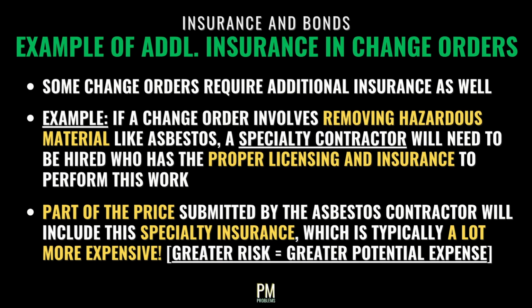Some change orders will require additional insurance as well. For example, if a change order involves removing hazardous materials like asbestos, a specialty contractor will need to be hired who has the proper licensing and insurance coverage to perform this work.